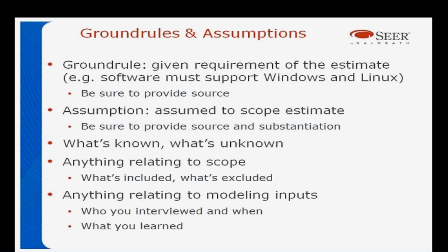An assumption is a little different. An assumption is something we assume will happen or assume will be there. So an assumption is something in the estimate that isn't something that if we do it or not, the project will be killed or not, but it's an assumption about what we believe this project is. For example, the assumption this project will have about 27 different input screens. Assumption the project will have to work over a heterogeneous network or whatever.